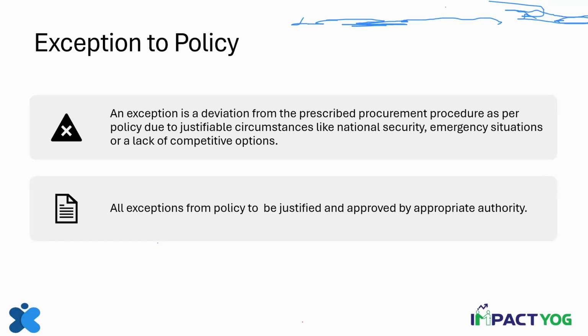So you might have a procurement policy where you have quality and cost based selection. But in quality and cost based selection, if for instance you said 75% on the technical scores, if none of them got 75%, will you make a deviation from the policy and say I will accept 60%? That is the deviation from the policy.